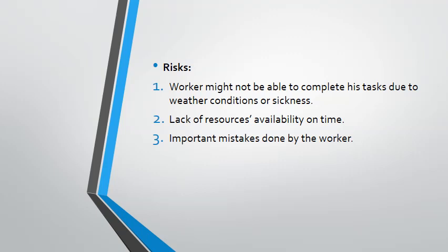One of the most important things to pay attention to is what your risks are. In this case, there could be days where the worker will not be able to complete his tasks due to weather conditions or sickness. This will bring a delay to the project, but it will be contained by either having a backup worker or having a double shift the next day after bad weather.